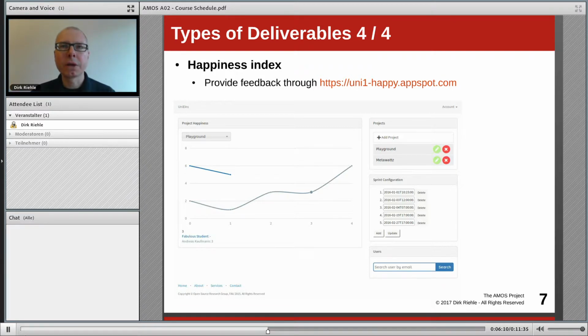happiness index is simply a value of happiness from -3, which stands for very unhappy, all the way to +3, which stands for very happy, that every member of the team, product owner and software developers alike, enter every week at the end of the current sprint as part of the so-called retrospective. You simply reflect shortly on how you feel and enter into our tool this single value to indicate how things